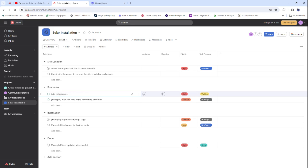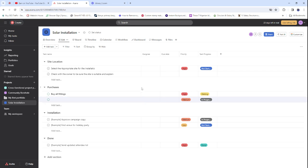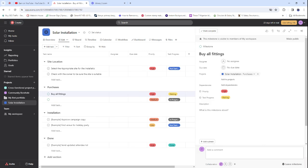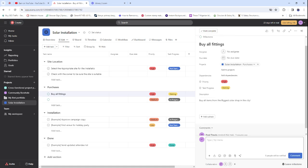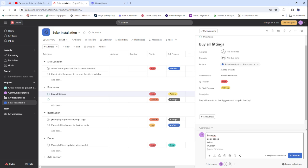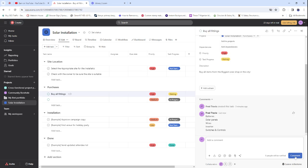Under Purchases, we add: 'Buy all fittings.' This is the primary task, so we can add more details and even subtasks. We specify: 'Buy all items from the biggest solar shop in the city.' The subtasks include: batteries, solar panels, wires, inverter, switches, and other controls.